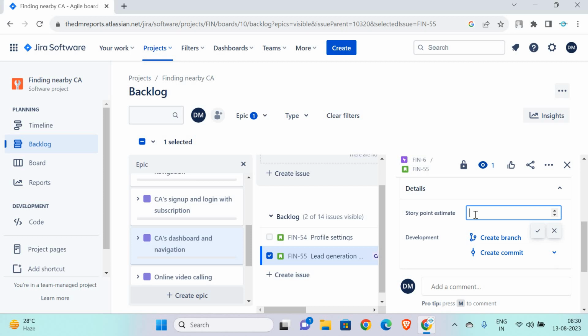Just think like when you are purchasing a T-shirt. We apply the T-shirt estimation technique in agile processes. So what is the T-shirt estimation technique? There are S, M, L, small, medium, large sizes of T-shirts. The size is important for the T-shirt purchase. Based on your size you purchase it, so you understand the weightage of that T-shirt. Similarly, if we convert that sizing into some points, like S we convert to 5 and M equals 10, like that.